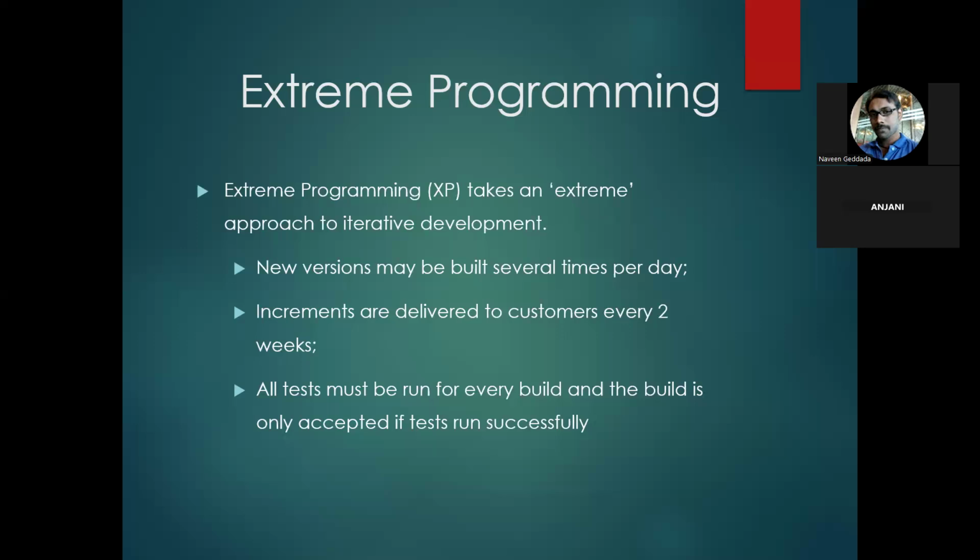Okay, so say, for example, the sprint duration is 2 weeks, and you have given the user story points as a five, in the sense of 5 into 8 hours, which is nothing but 8 working hours. Say it's 40 hours that you have given to that particular user story for designing the login screen, which is nothing but 5 working days.